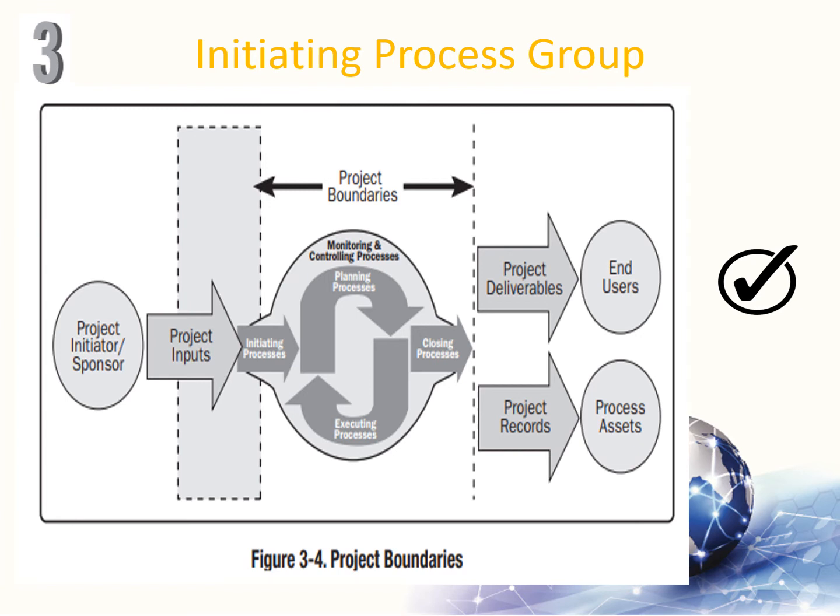Again, initiating processes may be performed at the organizational, program, or portfolio level, and therefore would be outside of the project's level of control. For example, prior to commencing a project, the need for high-level requirements may be documented as part of a larger organizational initiative. A process of evaluating alternatives may be utilized to determine the feasibility of the new undertaking. Clear descriptions of the project objectives may be developed, including the reasons why a specific project is the best alternative to satisfy the requirements, and the documentation for this decision may also contain the initial project scope statement, deliverables, project durations, and a forecast of the resources for the organization's investment analysis.